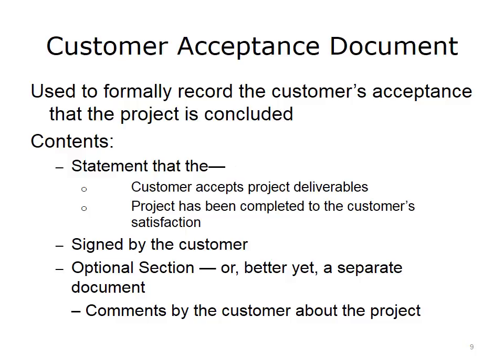As part of the customer acceptance process, focus attention on a customer acceptance document — a formal document marking the customer's acknowledgement that the project is completed satisfactorily and deliverables are acceptable. Such a signed acceptance can be very helpful in case there are questions later about whether the project satisfied the customer. This document may include an optional section for customer comments or suggestions for improvement in the spirit of continuous improvement. A preferred arrangement is to keep optional elements such as comments or suggestions separate from the formal acceptance document.